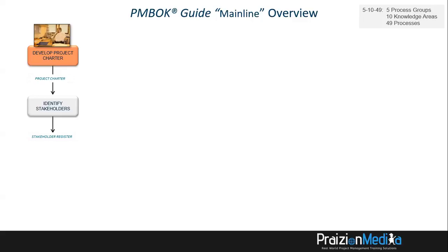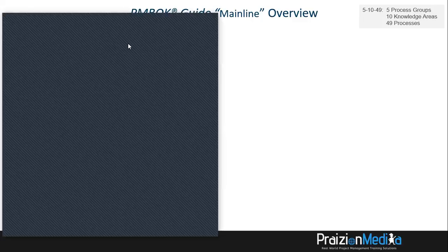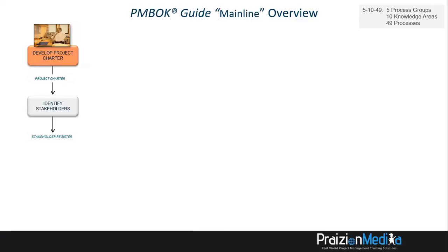But this is the very first stage where you think about your stakeholder list that comes from Develop Project Charter in the project charter. So I'm going to circle it on the screen right here just so that you are aware of what exactly happens here. This project charter contains your key stakeholder list, and your key stakeholder list becomes an input to Identify Stakeholders. And in Identify Stakeholders, this is where you flesh out that information. Now, let me share that with you on the screen here.